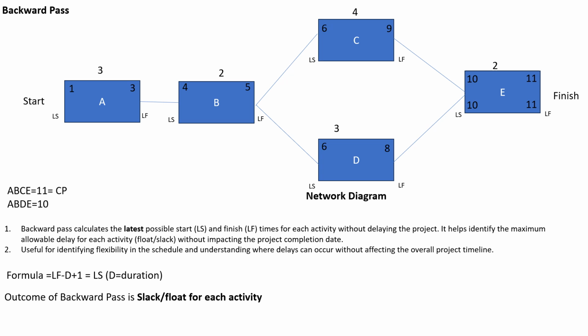Now we can go to calculate activity C or any activity. So let's go by activity C. Because days 10 and 11, two days, are utilized in activity E, activity C has to be completed by day 9. And when we have duration 4, you apply the formula: 9 minus 4 plus 1 is 6.